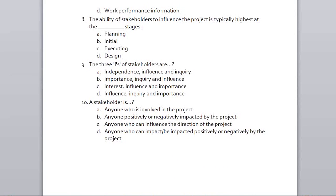Quiz question: The ability of stakeholders to influence the project is typically highest at which stage — planning, initiation, execution, or design? The answer is B — initiation. At the initiation stage, stakeholder influence is highest. Planning is primarily the project manager's own activity, and planning also spreads across a period of time. It is at the initial stage when stakeholder influence is greatest.